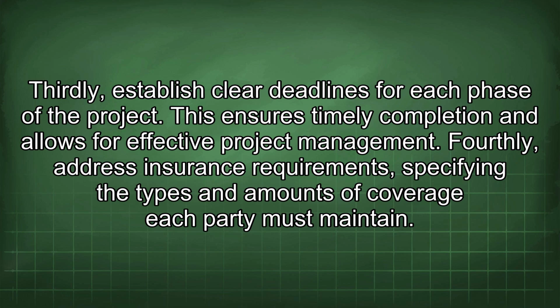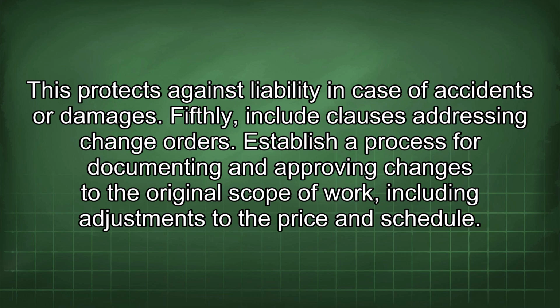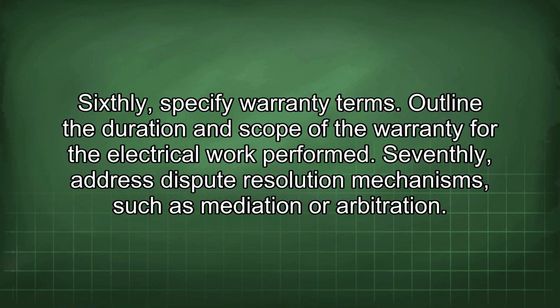Fourthly, address insurance requirements, specifying the types and amounts of coverage each party must maintain. This protects against liability in case of accidents or damages. Fifthly, include clauses addressing change orders. Establish a process for documenting and approving changes to the original scope of work, including adjustments to the price and schedule.